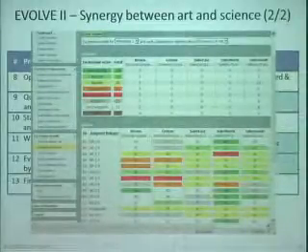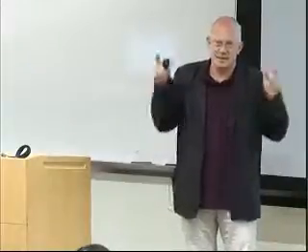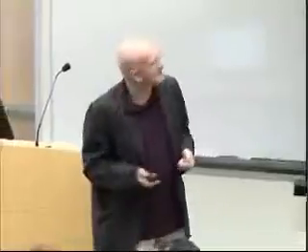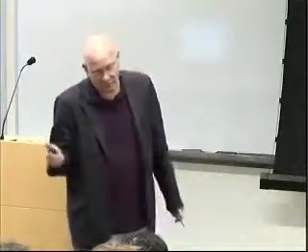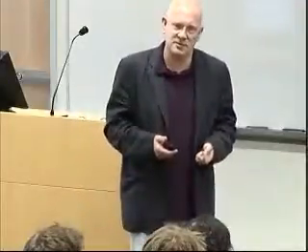When is a stakeholder excited with a feature? That's when he or she has expressed, this is of high importance to me, scored it in the highest possible way, that's 9 here, and finds this feature in the next release. That creates excitement. And the other way around, it would create disappointment, if not great disappointment, if the same thing would result in the announcement that this feature is postponed until whatever, right? So by just counting these different configurations between what was suggested from the prioritization against what is offered in the different optimized plans, that gives you some indication about the likelihood of acceptance. And that also gives you as a product manager, of course, a lot of information about what and to whom you should talk to explain and justify your product release plan, right?